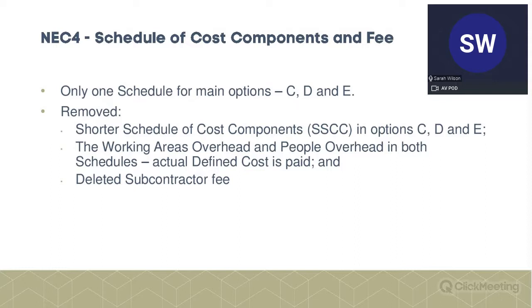That's now been removed, and you've got to look at actual cost. I think that's a retrograde step, because anything here where you can simplify it and use percentages instead of actual cost, particularly where it's likely to be a relatively small cost. So if you remember, we were talking about things like the cost of water, electricity, things like that. Where we can percentage those instead of actual cost and have to prove it is good, but it's been removed. So I'm sad about that.